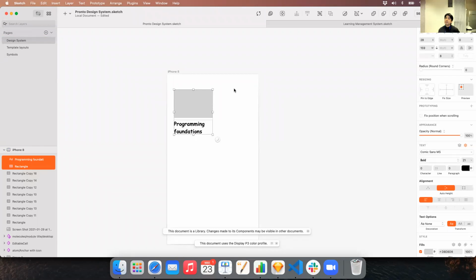In old school companies, it is a waterfall approach where first the managers talk between each other, and the developer doesn't even know that there is going to be a new project in the company. The managers settle on the budgets, the expectations, and so on, and they move to speak to the graphic designer and explain their wonderful idea. The graphic designers make this prototype, then they send it to the coders, and maybe 3 months in, the coders discover, oh, there is a new project in the company, and they start to write the code. And as you can probably think, this is the disaster project that Dina was speaking about.